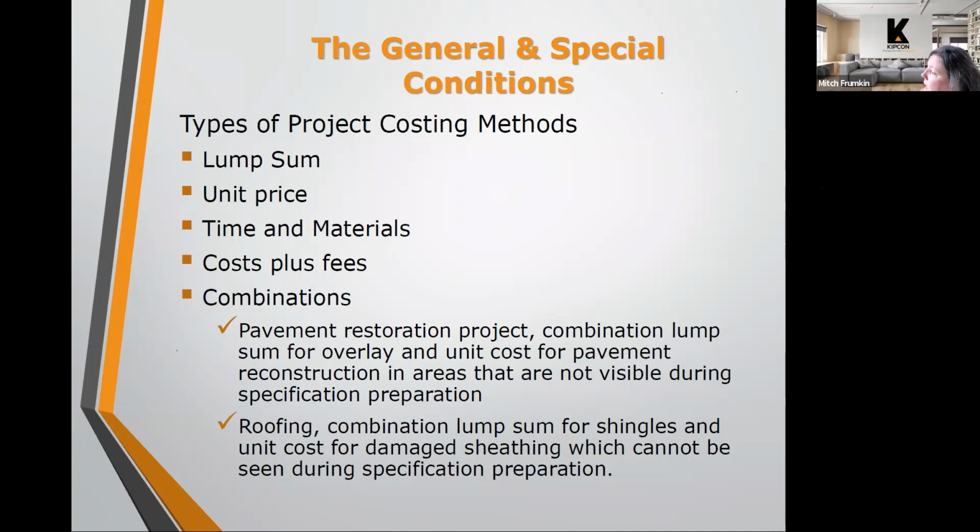Unit pricing is different in that we may be requesting square foot pricing or square yard pricing. It's per piece pricing. Time and materials is another way of cost that's often used by engineers during the contract administration phase, because we don't know what the contractor's schedule may be, or how often we may be required to be on site.